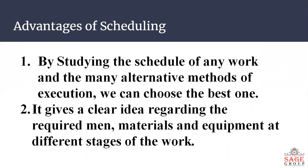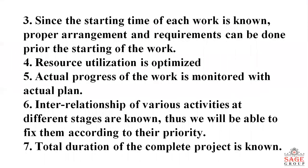The advantages of scheduling include: by studying the schedule of any work, many alternative methods such as excavation methods can be evaluated to choose the best one. It gives a clear idea of the required manpower, materials, and equipment at different stages of work. Since the starting time of each work is known, proper arrangements can be made, resource utilization is optimized, and actual progress of work is monitored against the plan.